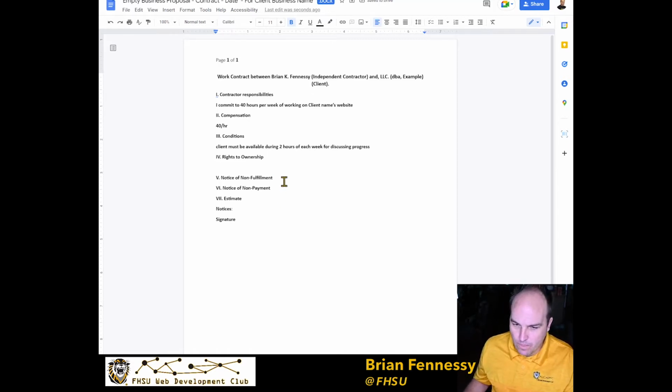And then rights of ownership. Now, that would be where you would say I own whatever I create, or you may license, which we'll talk more about licensing, anything I create indefinitely or however long the license is. And then notice of non-fulfillment. If you don't get paid, then I am able to collect, if you don't finish the project, the difference of hours worked. So you get at least the hours you put in if you're unable to complete, whether it's on your end or their end.